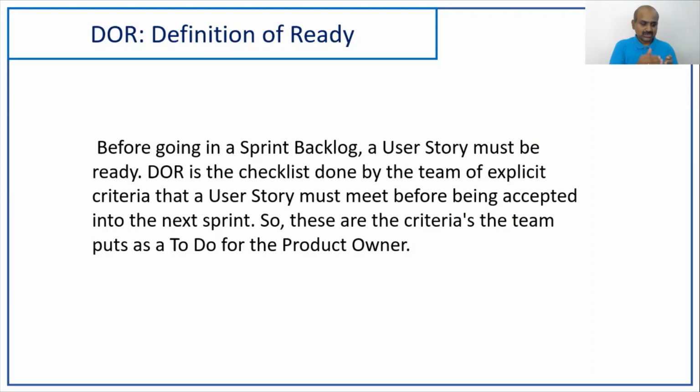Why? Because there was an external dependency and the input is not there. Some external hardware should be ready, but it is not there. External input should be there, but it is not. Some acceptance criteria is not proper, so people are not able to understand and cannot progress. What is the use of picking up stories into the sprint backlog, and on the third and fourth day you are stuck, and your velocity decreases.